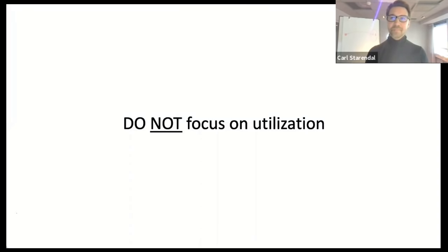So in order to optimize for flow, to get the lead time to be low, to get the throughput to have positive delta, and to have the flow predictability be where you want it to be, I can assure you, you're going to have idle hands in your ART, or at least people doing improvement work that could be dropped to help out if there's a bottleneck. So if you're focusing on everyone being fully booked at all times, you're going to see slow flow, long lead times, and low predictability.